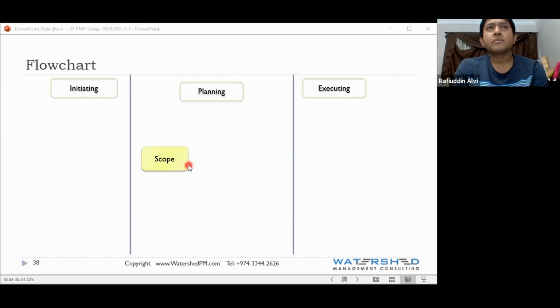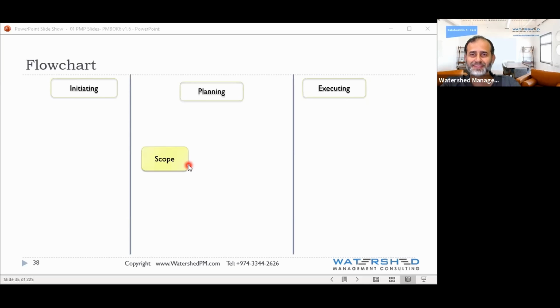Quality? Quality is also not last, because again, the same thing. Quality plan has implication on the project. Maybe you have to assign resources, so after quality, you will do resource planning. And maybe quality will require you to bring in third-party inspection, so now you have to do two more knowledge areas. You have to do procurement to bring in the third party, and you update the cost, because you have to pay them. So the cost plan will be dependent on what your quality plan says, correct? So quality is not last. What is last?